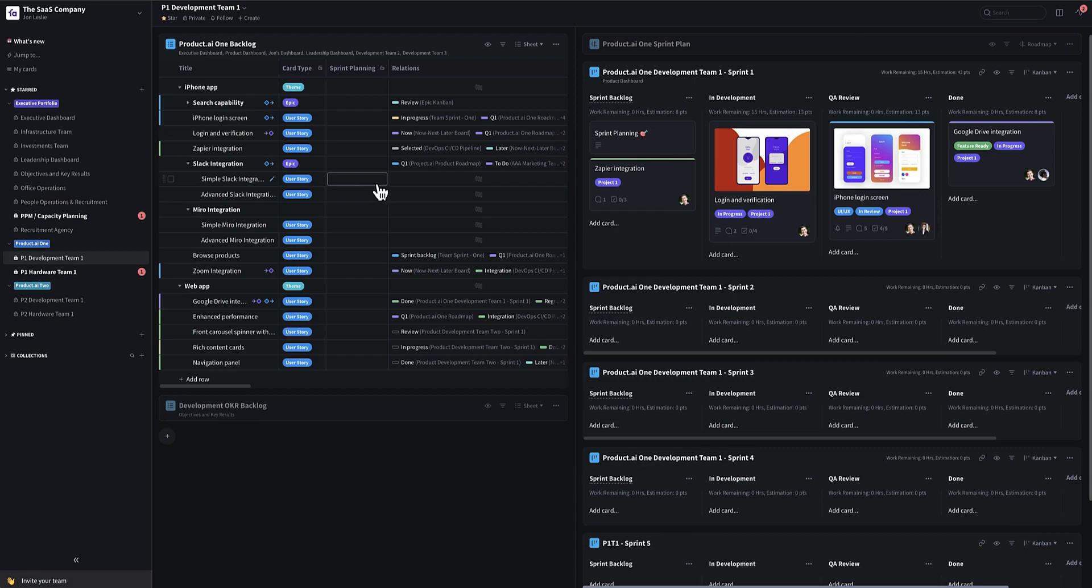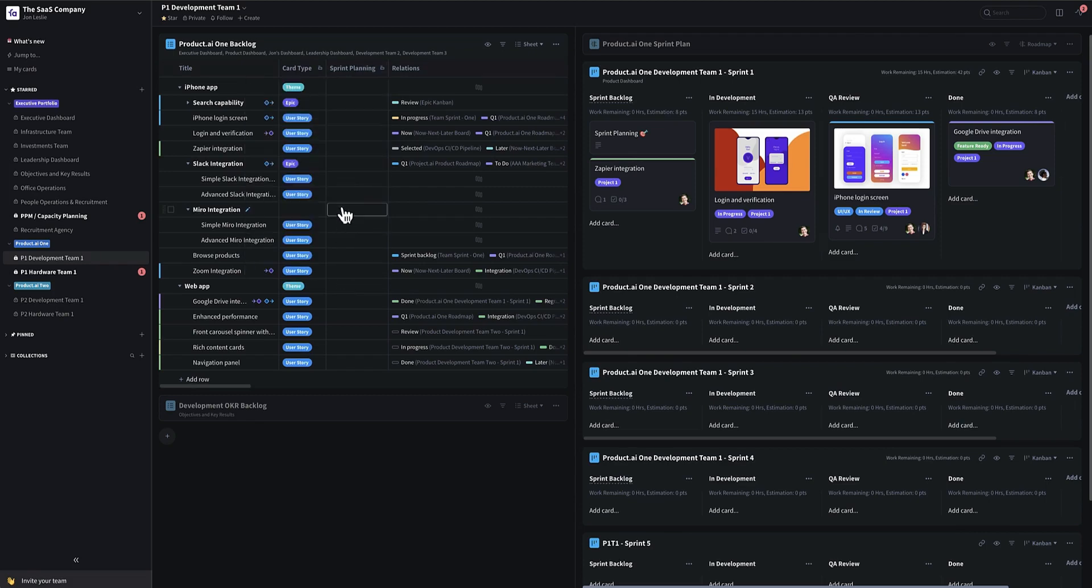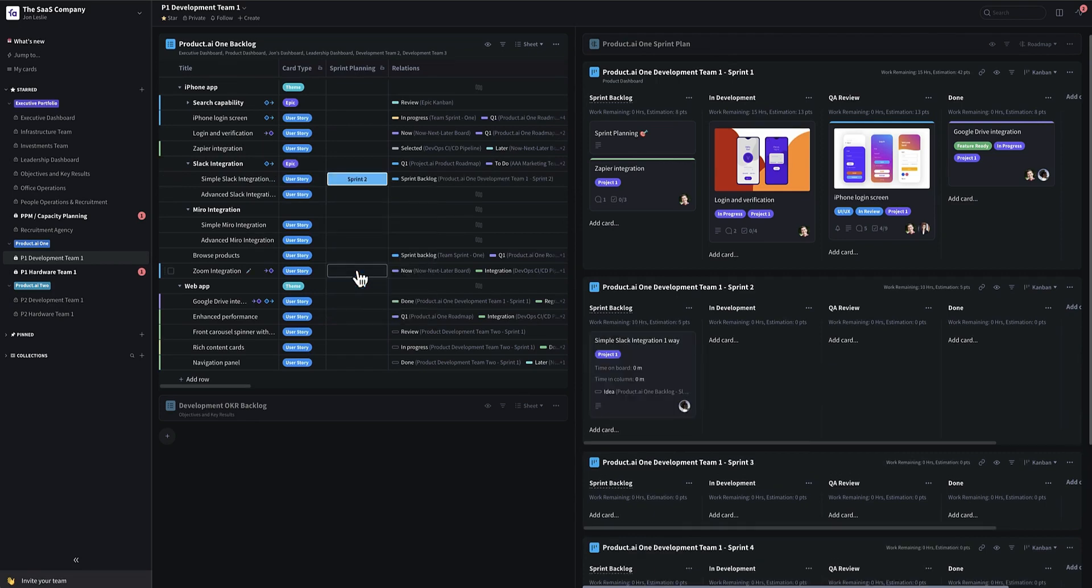So what I can do here is in the sprint planning column, which is just the custom column with a dropdown of all my sprints out into the future, however far out I want to go, I can click here and say, okay, this is something we're going to need maybe in sprint two. Boom.